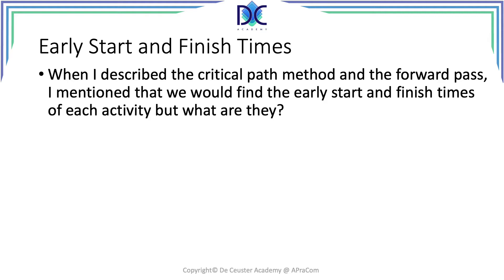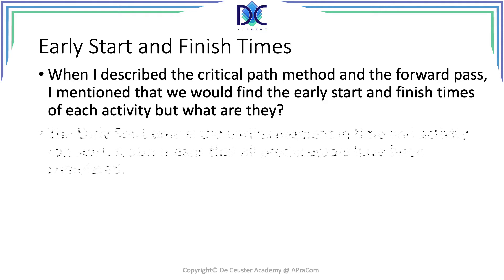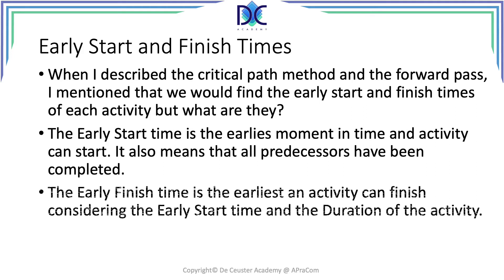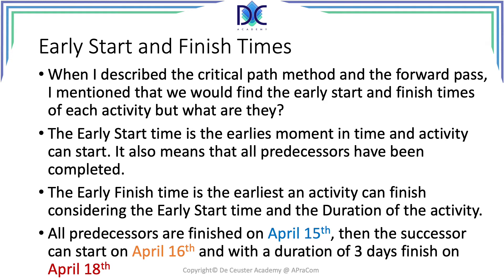During the forward pass we look at activities at their earliest start date, so we find for every activity the earliest end date as well. The early start is the earliest moment in time an activity can start, which means all the predecessors have been completed before, because the predecessor relation says the successor activity can only start when all predecessors have been completed. The early finish time is the earliest an activity can finish when we consider the early start and the duration.